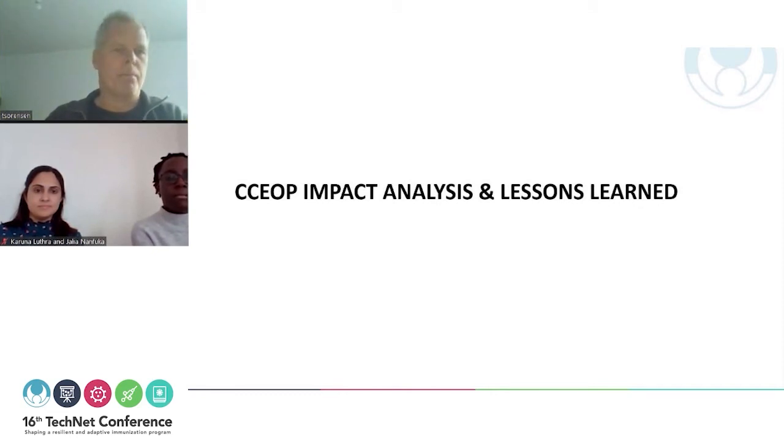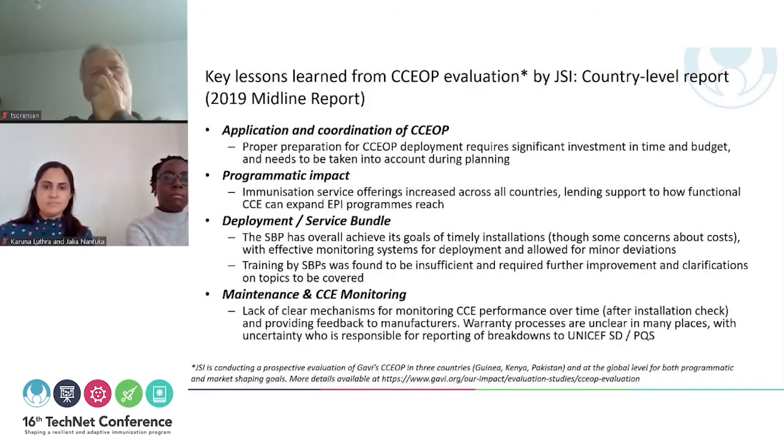Thank you, Thomas. So with a project this size, it's important to measure the impact that it's having on the program, as well as iterate once we learn the lessons, so that we can make improvements on our processes. Gavi had commissioned a study which was conducted by JSI, and in the application and coordination of CCEOP, they saw that proper preparation for CCEOP deployment requires significant investment in time and budget, and this really needs to be taken into account during planning. It takes a long time for these things to happen.